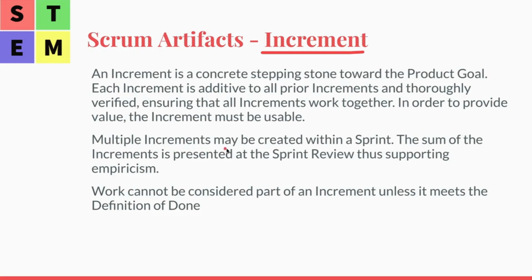So multiple increments may be created within a sprint. The sum of the increments is presented at the sprint review, thus supporting empiricism. Work cannot be considered part of an increment unless it meets the definition of done. So we're going to talk about definition of done, okay?